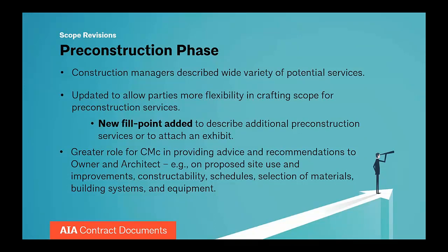One of the many things that our task group also wrestled with was how much detail we should provide in the base agreement to define the pre-construction phase services. Again, we asked for input from a lot of construction managing firms and found a wide variety of approaches and service scopes, but frankly, very little consistency between them. From the interviews, one change that they wanted was a way to tailor the documents for the scope of their pre-construction services without having a lot of restrictive language that they always would need to edit. So our revisions address this issue by providing a series of fill points in the owner CM agreement where all of the pre-construction phase services descriptions either can be inserted or can be attached and referenced. Even so, we did identify a number of tasks that expanded the construction manager's responsibilities that reflect what we're seeing as modern project delivery. Next slide.